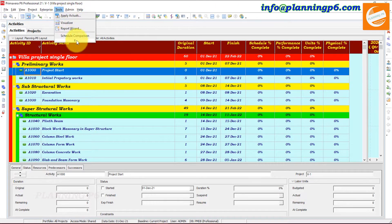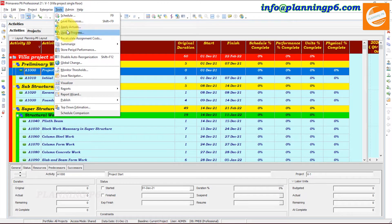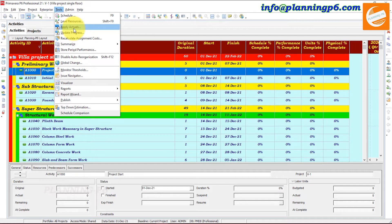So how we can apply actuals and what is the purpose of this option? It is basically located here in Tools — the third option is Apply Actuals in Primavera P6 schedule. The purpose of this option is that when you apply the actuals it will complete your schedule up to the date which you have mentioned. It will complete the Schedule Percent Complete, Performance Percent Complete, Units, and Physical.